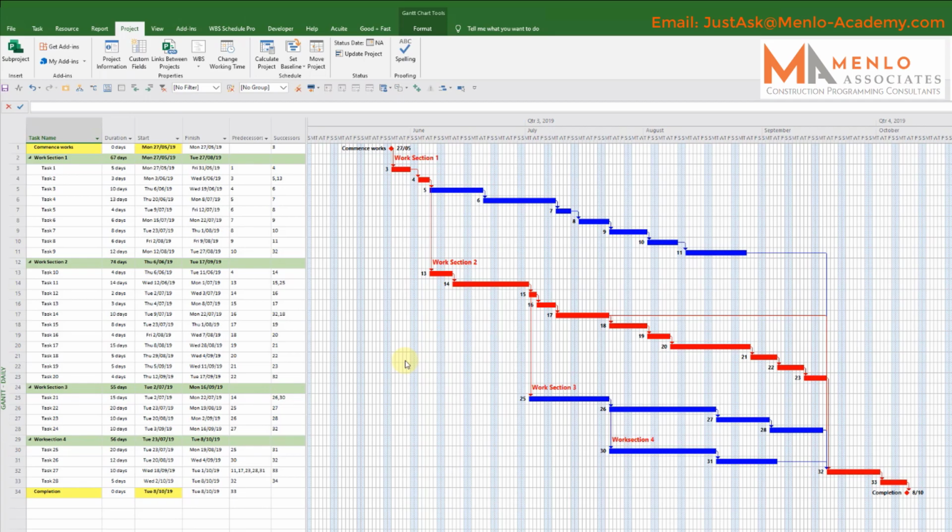If you don't know how much slack you've got in the job, you don't know whether the job can wait or whether it has to be done now or within the next day or two. It sets a natural priority for works running through the job. So the next question then is, how do we know exactly how much total slack there is? And the answer is, it's actually quite straightforward. Project works it out for you.